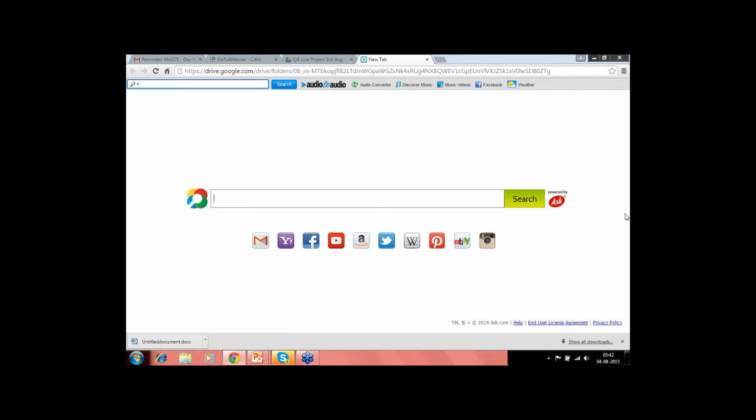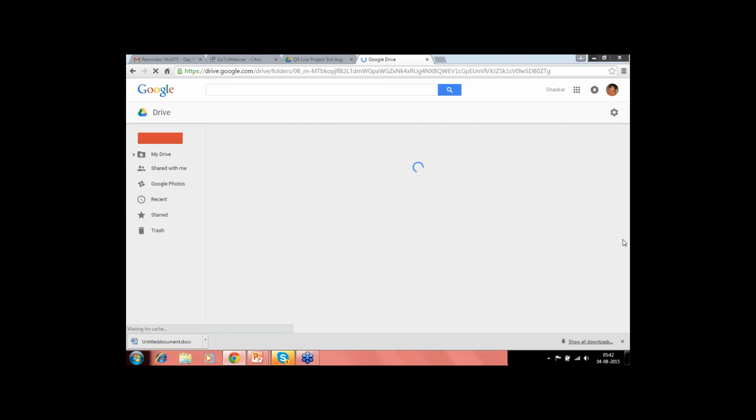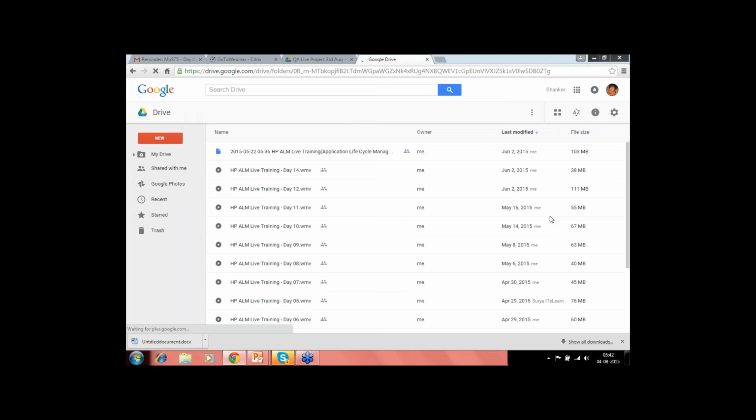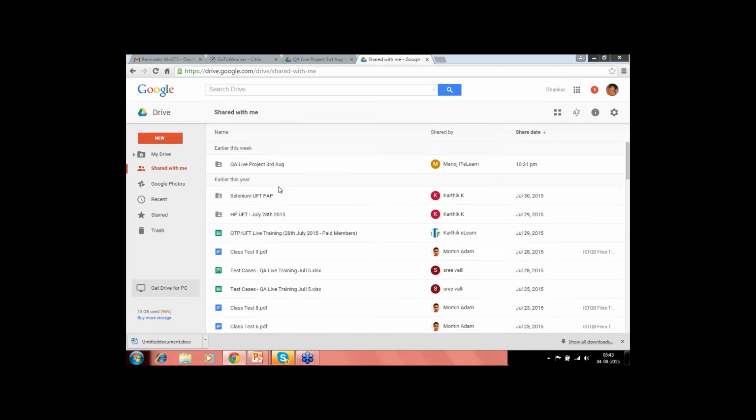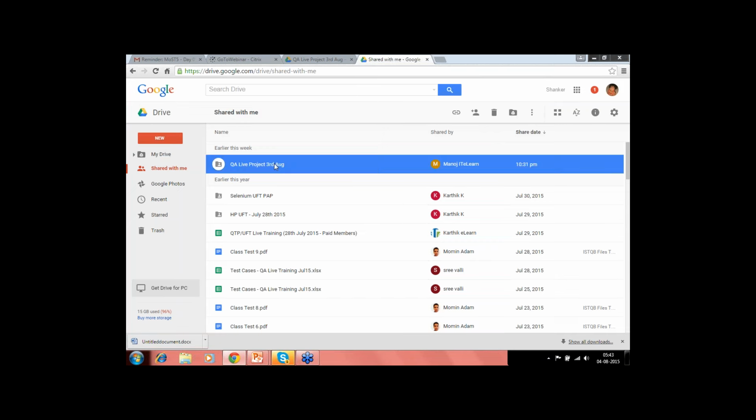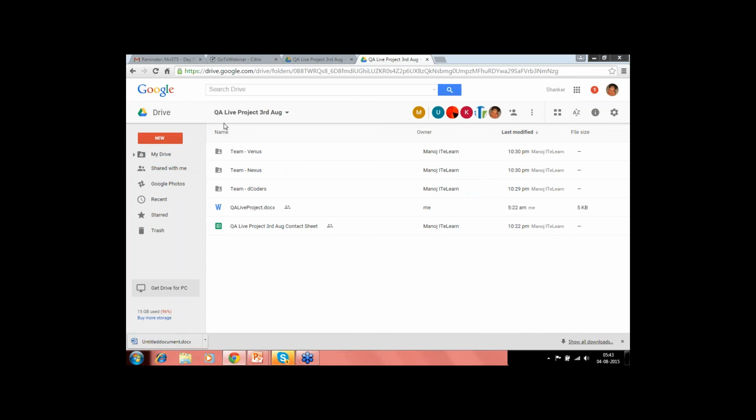Okay, Ehsan has one question. How do we give project status update to a QA manager or lead? Defect tracking is where you log all the issues, but somewhere you have to tell the total number of test cases that I have executed, these many failed, these many passed, etc. And somewhere you have to say these are the total number of bugs that I found, and these are closed, open, etc. So you have to give 2 different things.